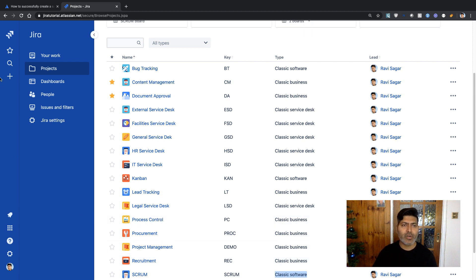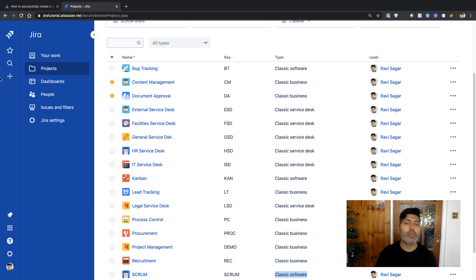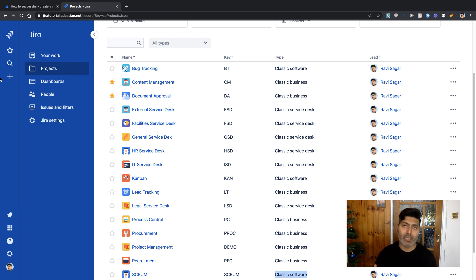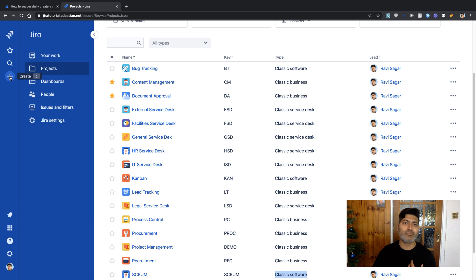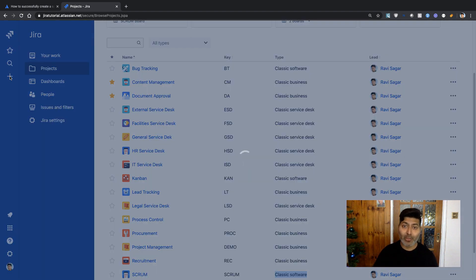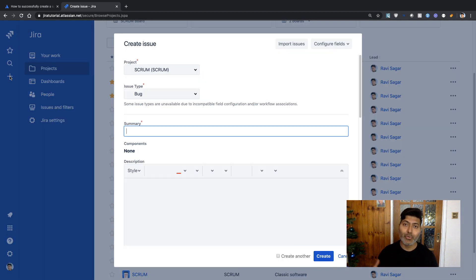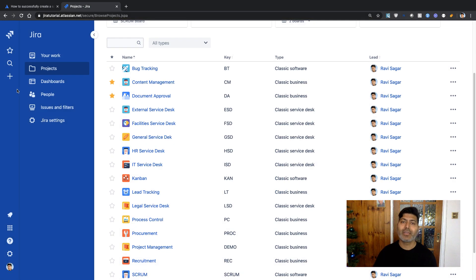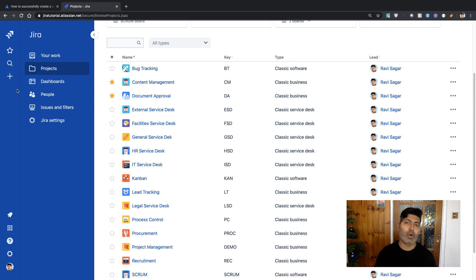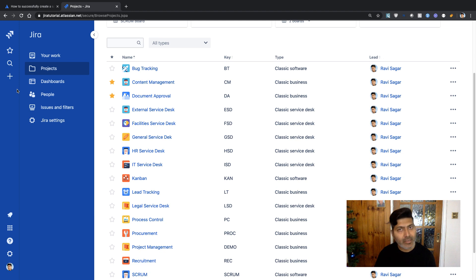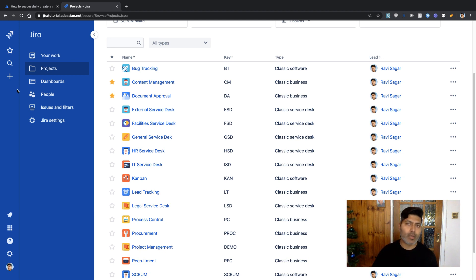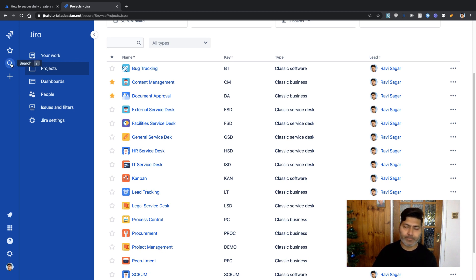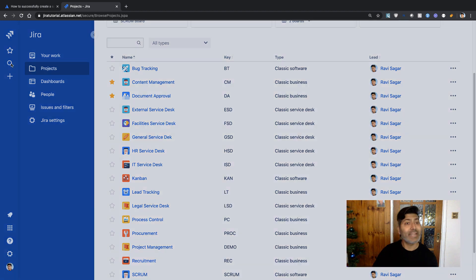We have a few projects we can potentially use. The first approach is to create a filter to include these projects. But the good thing is you can use Jira software functionality to create a board and choose which projects to include. Then you can create sprints and your backlog will display all issues from multiple projects. Let's do that.